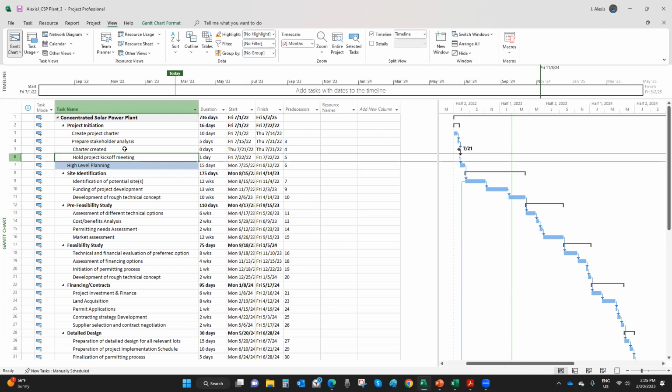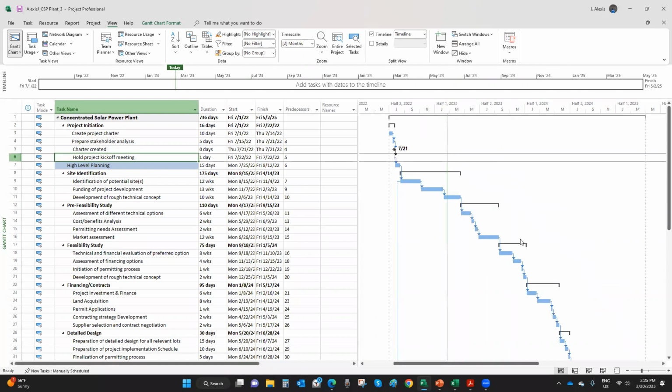And the validity of a schedule depends entirely on its logic. Now, if there are activities that require resources that do not have resources, they will not be performed. If there are activities that are not part of the network, then the software will not take them into consideration when it looks at the possible durations of your project.